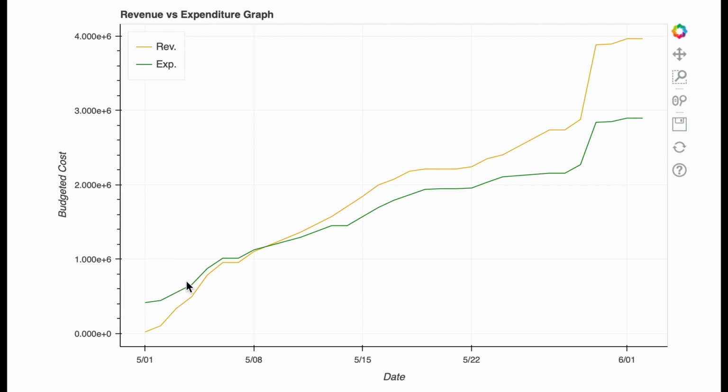Before the break-even point, we have a loss in our project, so that we need extra financing to carry out this task until 10 days of the project, so as to go forward to the next phase of the project. In such a way you can figure out operating cost gaps in your project, so that you can manage it easily and efficiently.